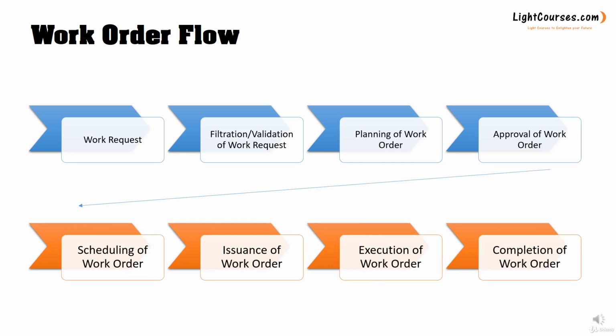and after that, they are supposed to finalize the work order by giving feedback, as we will discuss. They are supposed to stick to the job plan which was previously approved, and if there's any modification or change in the job plan, they are supposed to give feedback: if they used a different spare part than the one planned, or if the estimated duration was not correct.